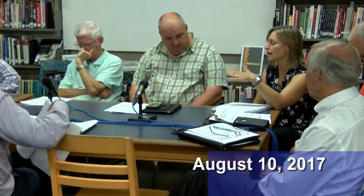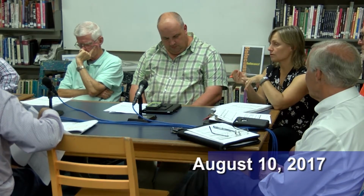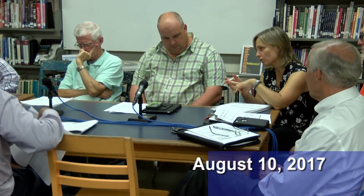Just a reminder, that'll go out in September. We'll have bids coming in end of September, bid review probably early October, with the goal of, by the October SBC meeting, having a pretty good sense of where we are. And as with technology, we'll have two installation periods, one in February, one at the end of the project, about a year from now.